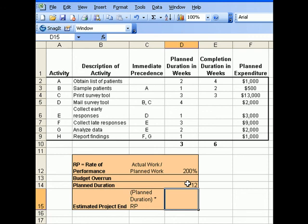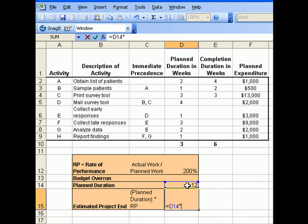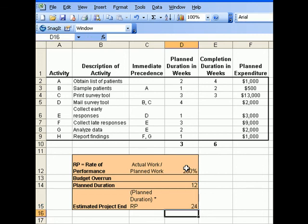To get the estimated project end, we'll take the planned duration, which is 12 weeks, and multiply that with the rate of performance, which is 200%. The estimated project end is 24 weeks, which is actually two times longer than we thought based on how long it took for the first three activities to be accomplished.